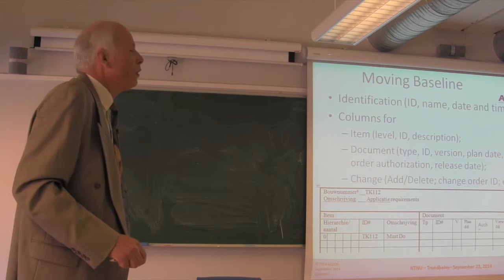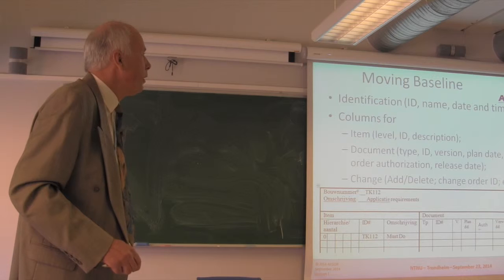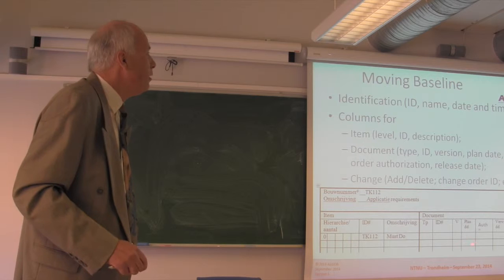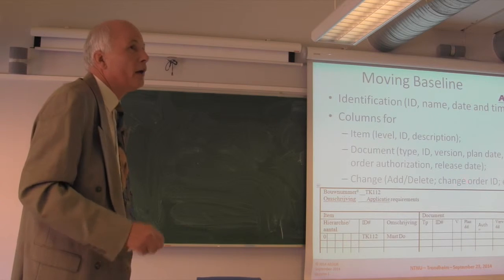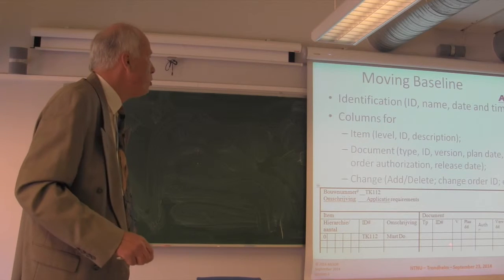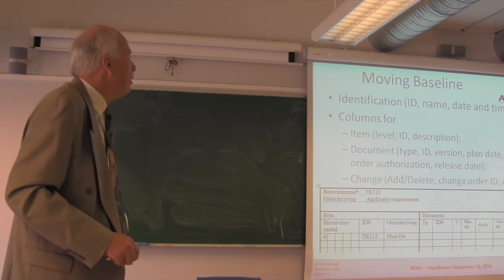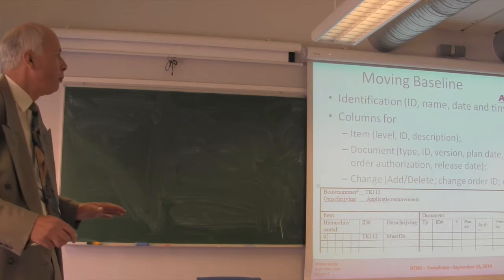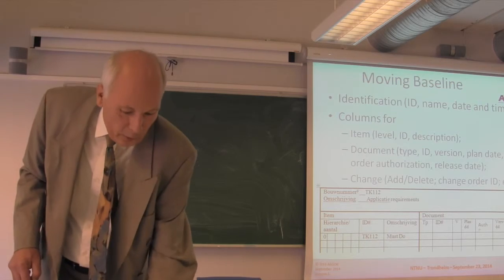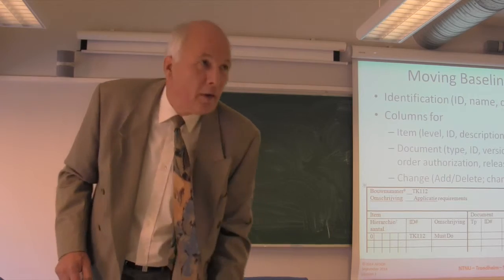This happens to be perfect to keep the total overview of the project. And if plans are changing, it's not forbidden to change, but you can compare with all the versions of all the dates and times what has been changed. In that sense you can also control whether you are behind schedule or not. So this is about the moving baseline. If you never heard of the other ones, I would say forget them and try this.